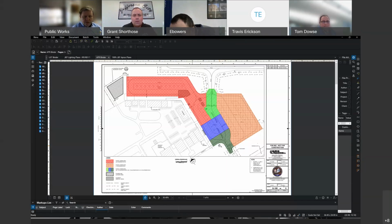The answer to the question is we envision that in that red area from the north ramp to the main ramp, there would be an hour or two in the morning and in the evening where you'd be able to tug aircraft to and from. So if you're going to use it that afternoon, you tug it out there in the morning, you store it on the main ramp, and at night, after the flight, you wait till evening and then you tug it back and put it back in the hangar. That's the north ramp to the main ramp.